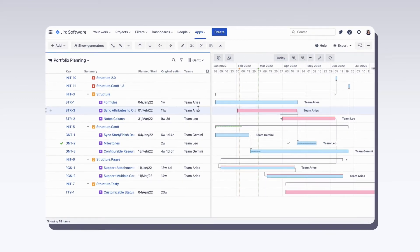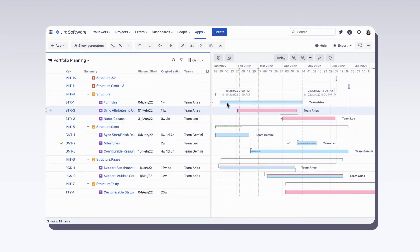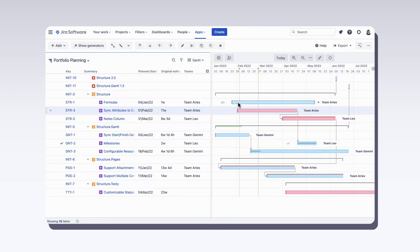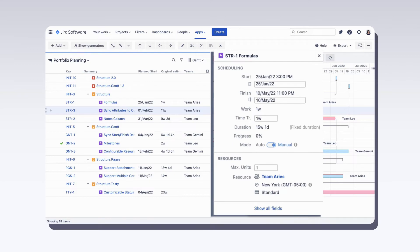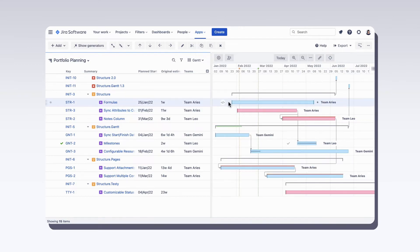Task duration can be calculated based on the work estimate and capacity of assigned resources, or the task can have a fixed duration defined by the start and end dates. You can see this information in the task details panel.